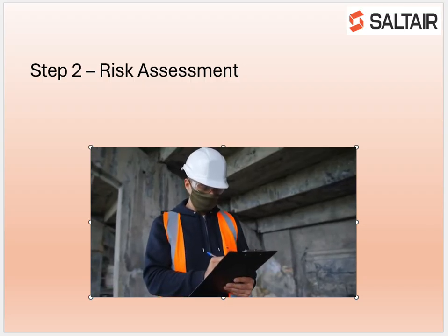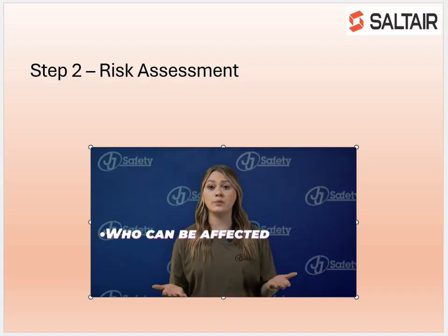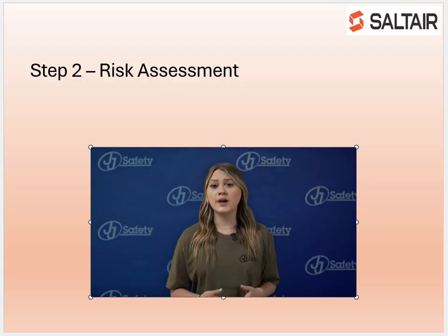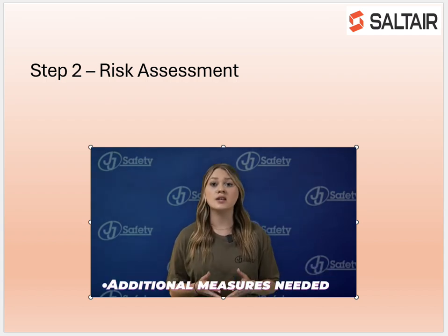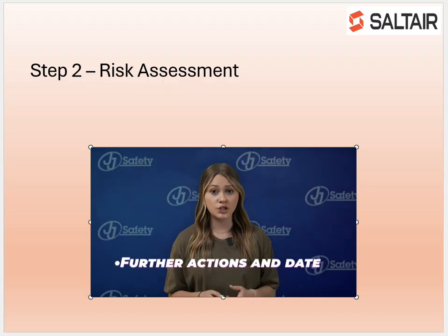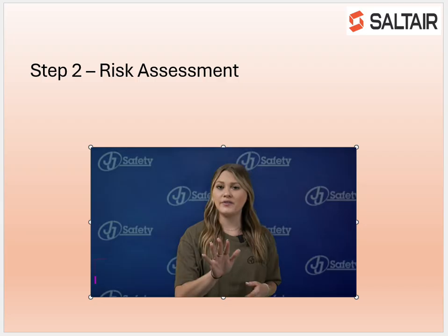When you record your findings, be sure to include any evidence you've taken into account, everyone who can be affected, and their risk level of the hazards. You should also include measures that are already in place to control the hazards and any additional measures needed. The records must also include any further action you need to do and the date of when you intend to implement these actions.